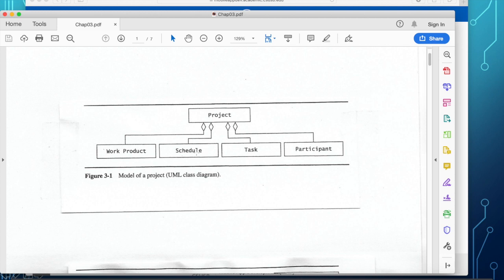There are two milestones here in our software development. By the seventh week, you should be producing the first prototype of the software project, and the second prototype will be produced on the final. So we have two iterations following the agile software development.